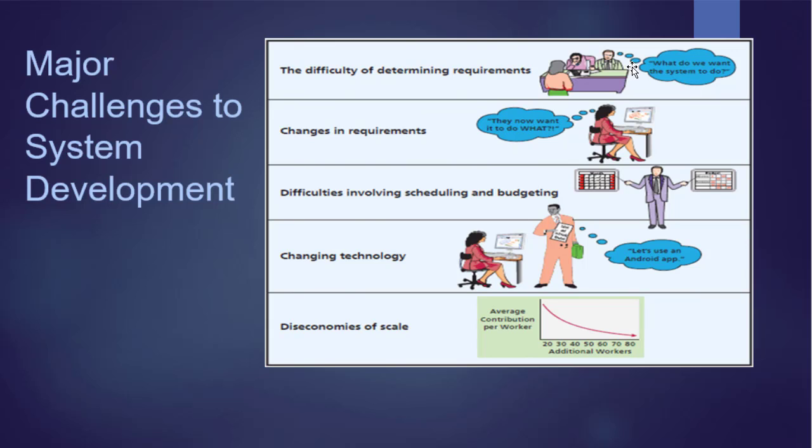Another thing that happens during projects is something called scope creep. Scope creep is where the requirements or the scope of the project changes as the project moves along. So you have actual users, managers who will be in charge of the system. They see what the system can currently do and they keep adding to what they want the system to do. And so those requirements keep adding up, and that's the reason why projects go over budget and why sometimes they never finish. And so that relates to this process in terms of scheduling and budgeting.